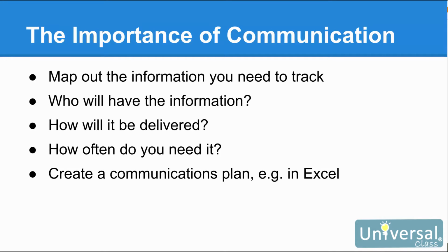It is important that you map out what information you need to track as the project commences and advances. Who will have the information you need to track? How should that information be delivered to you? How often do you need this information? By creating a communications plan, you can specify ahead of time what information you need, who will deliver it to you, and how often. You can create a communications plan easily enough using Excel.